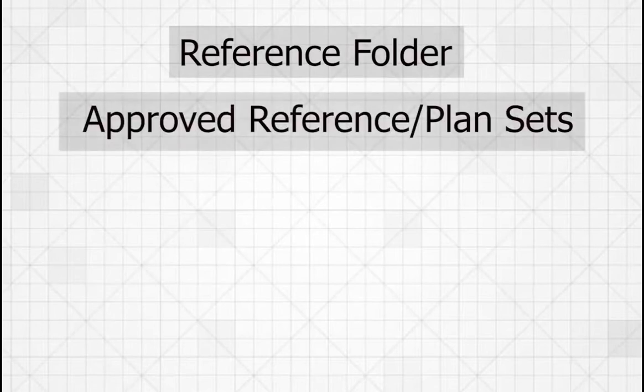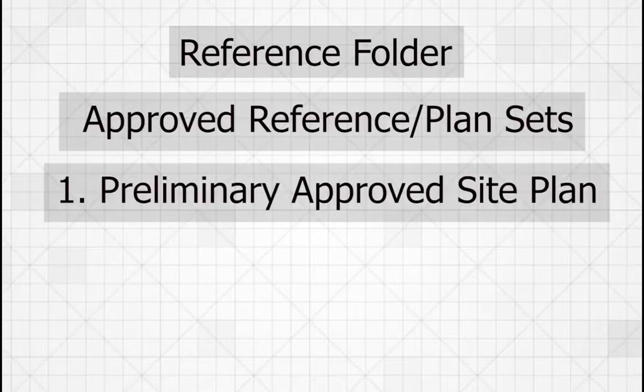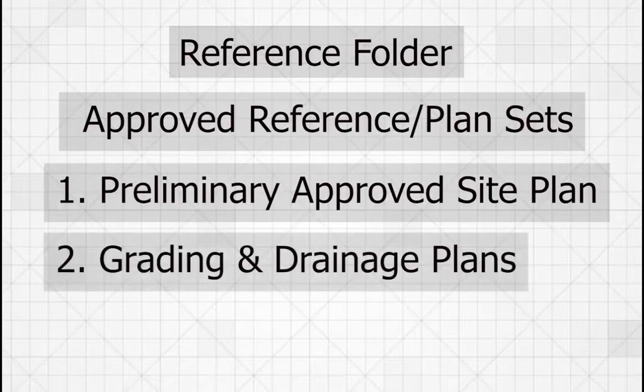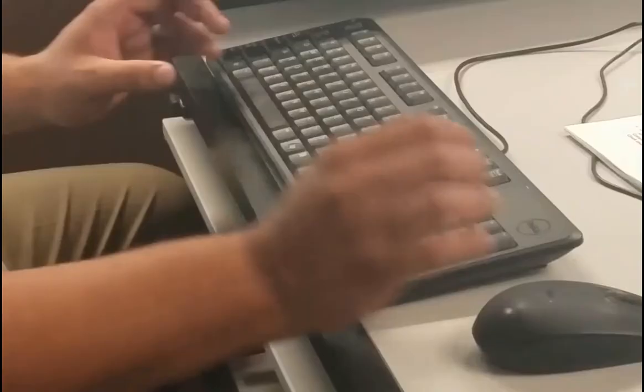The reference folder is for approved or reference plan sets, such as the preliminary approved site plan, the grading and drainage plans, stormwater, and landscape plans.